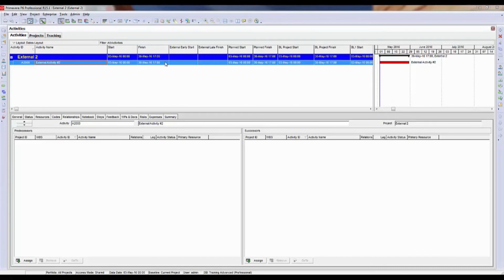What was discovered is that the remainder of that work was imported from a contractor or from an external source, and it had an external link on it in the previous system, but we didn't have that external link in our system. The import process automatically populated an external early start date on it, and that caused the path towards the tail end of this path that I was working with to turn red and show negative float and go critical because the external early start date was putting pressure on that path as if it was a constraint.